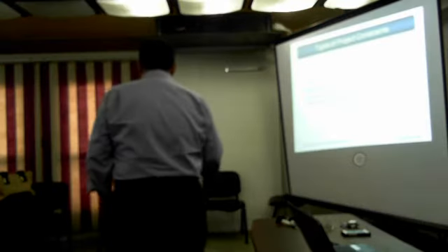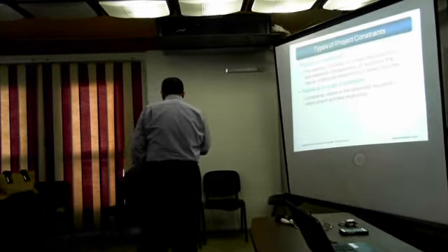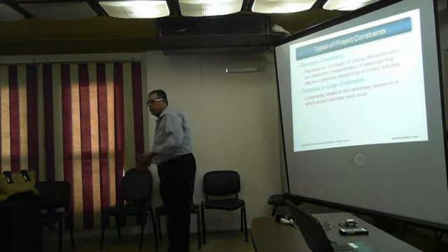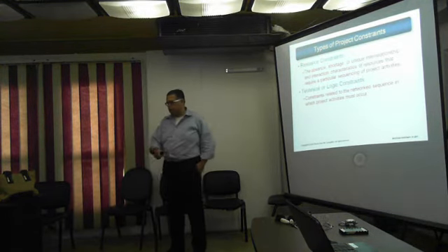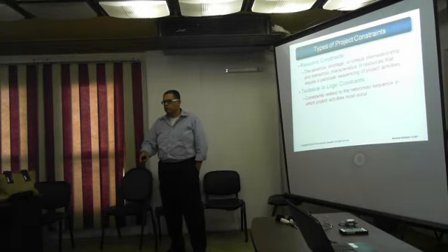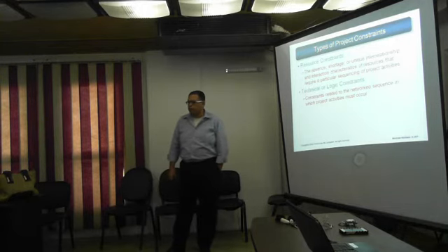Technical constraints are basically constraints related to the network sequence in which project activities must occur. Technically, I cannot lay down the cables before digging the trench. Okay, this is a technical restriction. I cannot do this activity unless I finish digging. I cannot just lay the cable on the ground, just like that. So this is what we call a technical or logical constraint.